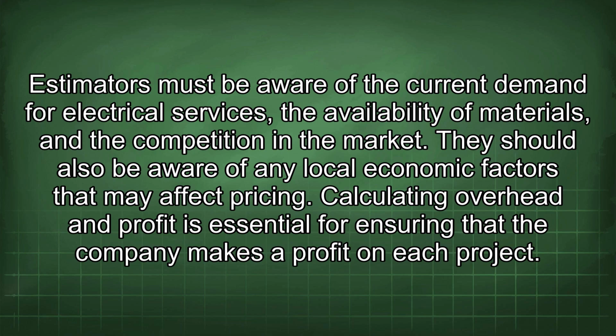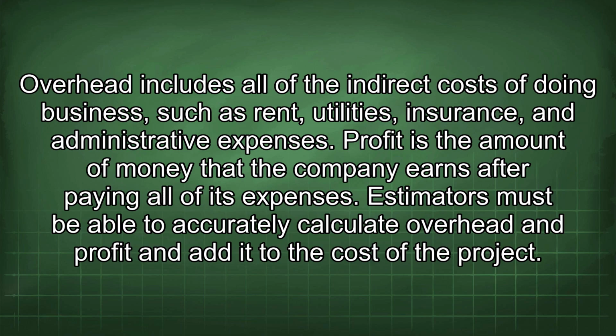Calculating overhead and profit is essential for ensuring that the company makes a profit on each project. Overhead includes all of the indirect costs of doing business, such as rent, utilities, insurance, and administrative expenses.